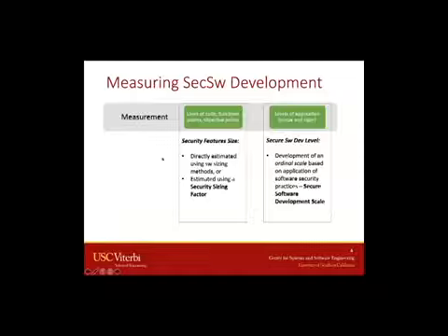So taking those two elements, for the security feature size, we can directly measure them using sizing methods. But if the team or the organization doesn't have expertise to do this sizing estimation, we can use historic data to determine a security sizing factor to help estimators.